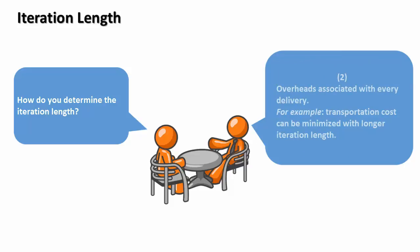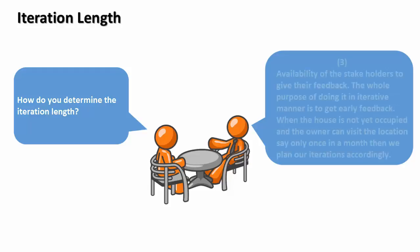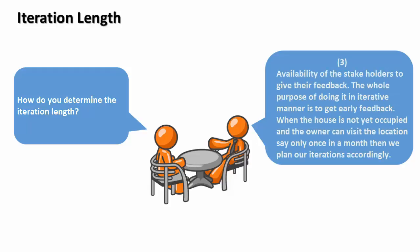Second: overheads associated with every delivery. For example, transportation cost can be minimized with longer iteration length. Third: availability of the stakeholders to give their feedback. The whole purpose of doing it in an iterative manner is to get early feedback. When the house is not yet occupied and the owners can visit only once a month, we plan our iterations accordingly.